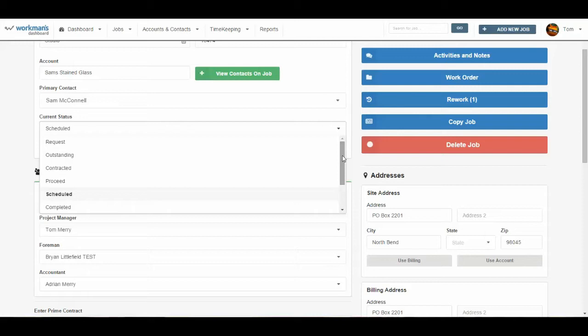In our asphalt contracting business, we typically ask for 50% down upfront, down payment. So we will often have a lot of jobs in contracted. We're just waiting for the customer to send us a 50% down payment. There could be things that we are obligated to the customer. So for example, they might be asking and waiting for additional insured documents from our insurance company, or any number of things, paperwork, clerical things that we know that we're going to do the work at some point, but we just aren't quite ready to schedule dates on the calendar.